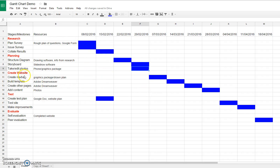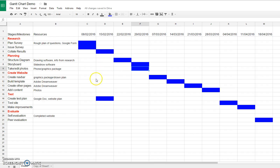For instance, I can't create my website here, which begins on the 7th of March, until I've planned it, the task that I've started on the 22nd of February. There are some tasks here, I think I could create a test plan at the same time that I've collated the results of my work.